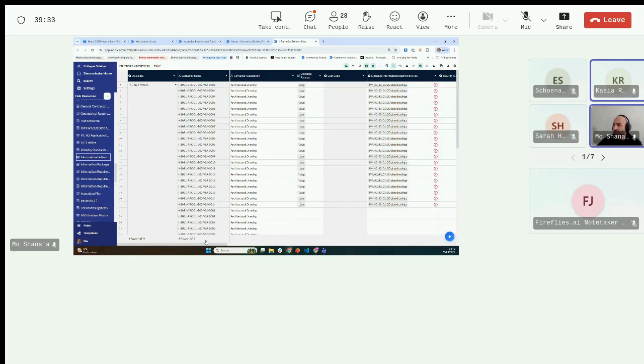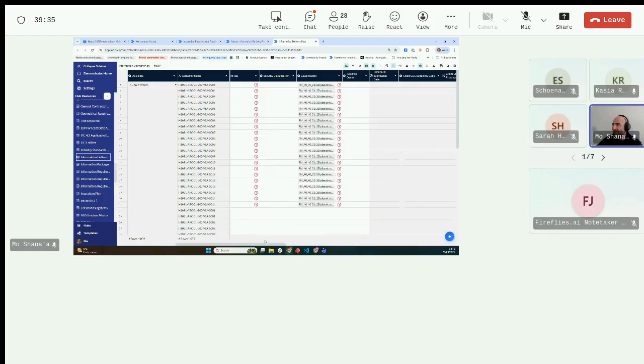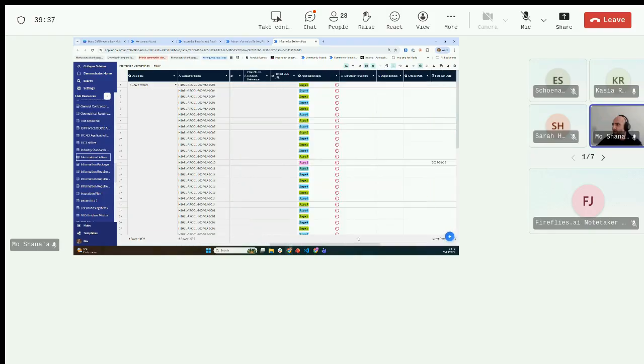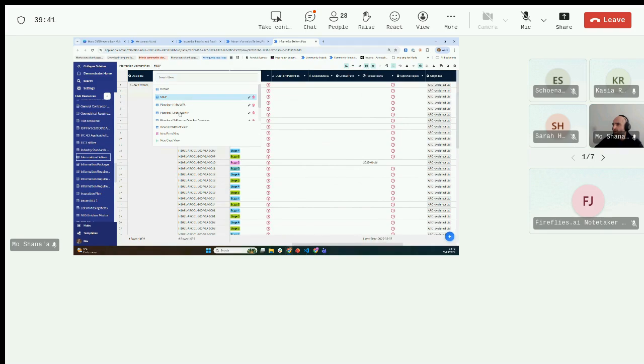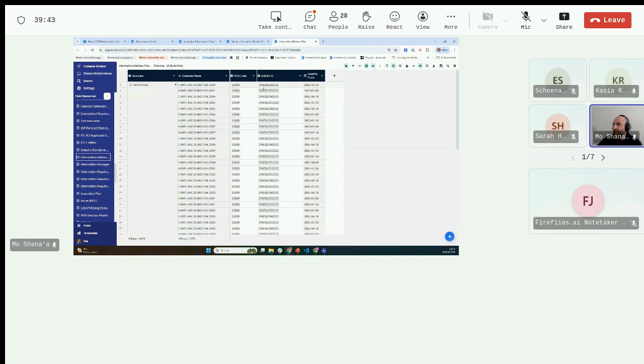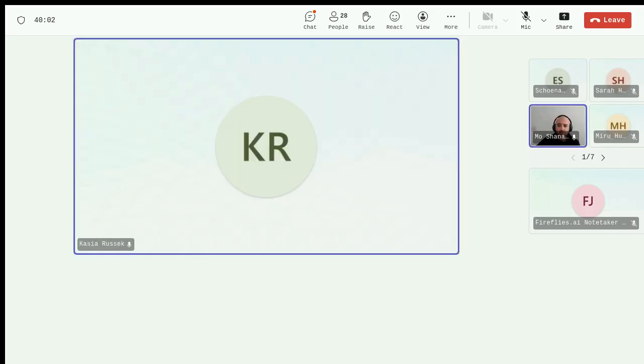For each of these deliverables, I can link that to an activity or a task that's in Asta, and then I can use that to derive the finish date, when it's actually required. Oh, right, okay. And then if you wanted to bring these and put them on a Gantt view, you can. Okay, no worries. That's okay. Cool. Thank you. Awesome. Thanks.